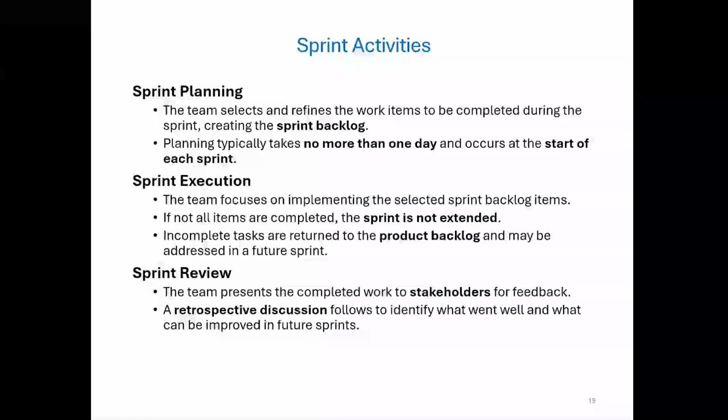And after that, the team holds a short meeting called a retrospective. This is just for the team to talk openly about how the sprint went: what worked, what didn't, what should we do differently next time. It's a chance to continuously improve not just the product, but the process.